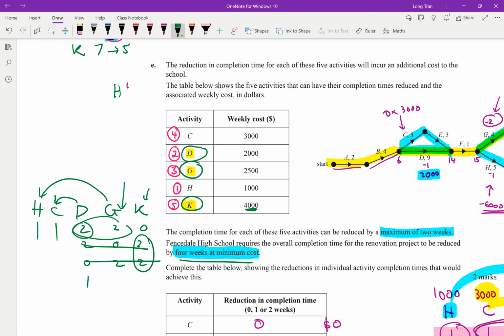And we figured 1, 2, and 1 because G was linked to H, which was the least amount of cost. That's why we went with 1D, 2 G's, and then 1K was actually the best option from what we saw, because every time you did double Ds, that gave you an occurrence of an extra 1C, which worked out to be 7,000, which is only the second worst, given that double Ks give you already an 8,000. So that's one of the reasons why.